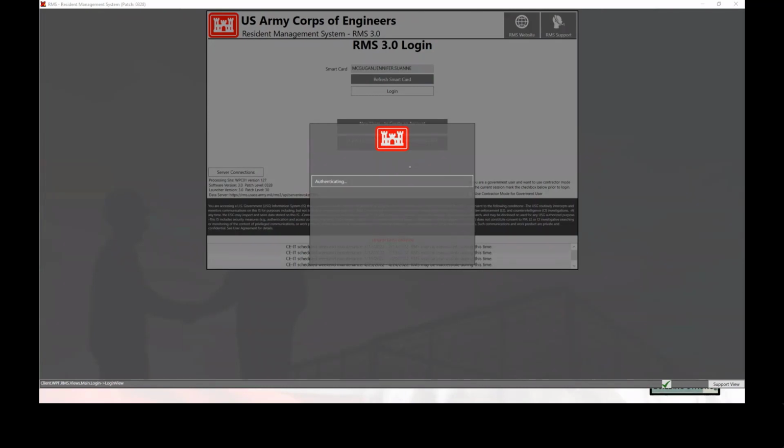Look and see if the title of that activity is the same as an activity that's already in RMS. If that's the case, then that means that the contractor's scheduler has changed the activity ID in their scheduling software. So that way, when it gets imported the next time, it's going to be different. So you want to make sure that you check that information. And if it's not right, I personally wouldn't accept it. I'd go back to the contractor and tell them, hey, you need to update this.